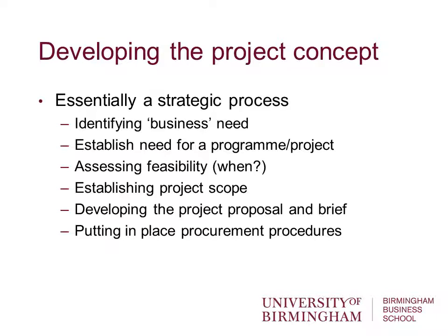Once that's been done, then we can think about feasibility. How feasible is the project? I put in brackets there a question, because the thing about feasibility is that at the outset, the scope, scale, cost and so forth of the project will be very, very loosely defined, very vague. And so it's very difficult to say whether the project's feasible, because there'll be such a range of possible costs, possible durations for the project. As time goes on and more information is gathered about specific aspects of tasks and so forth, then more precise measures of cost and time can be established, and then more accurate feasibility assessments can be made.